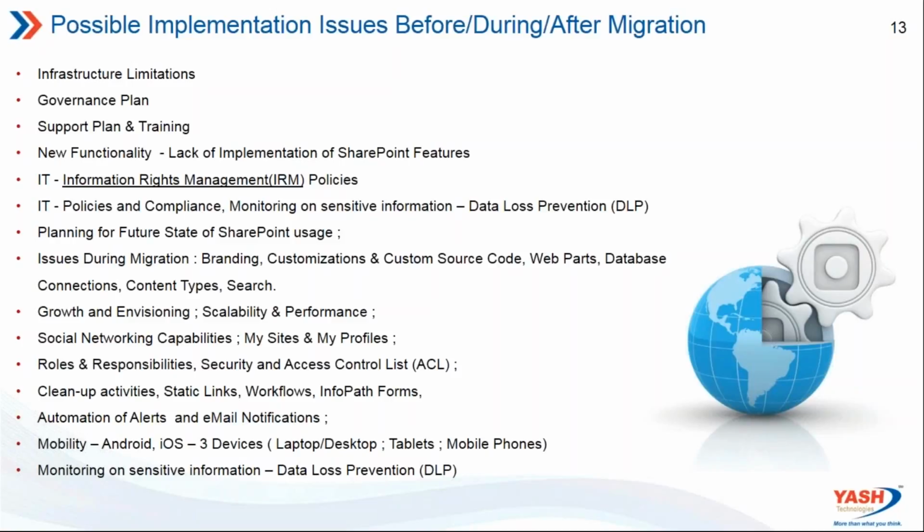And during migration, from SharePoint 2007 and 2010 especially, branding, customization, custom source code, custom web parts, database connections, this will be a worrisome issue because these will fail. This will 100% fail, in fact, and we need to fix them after migration is done. So after migration, the fixing phase will be another one based on the SharePoint version we are in.